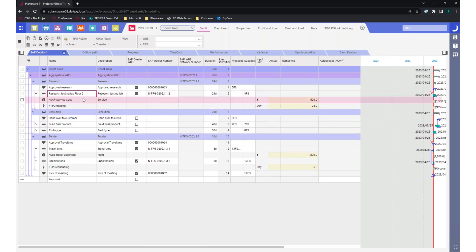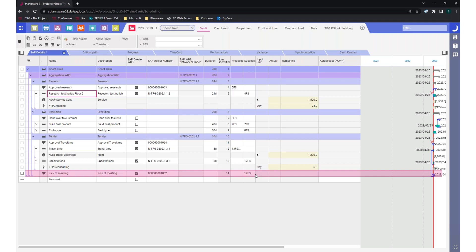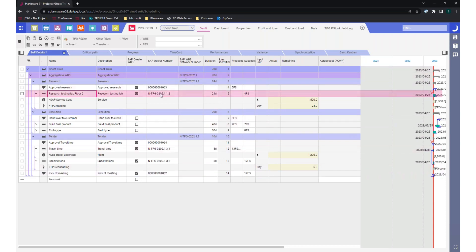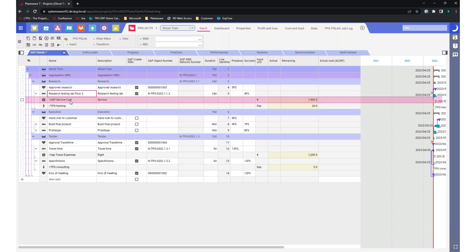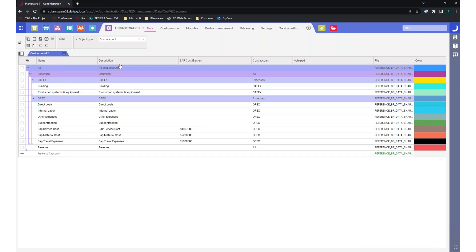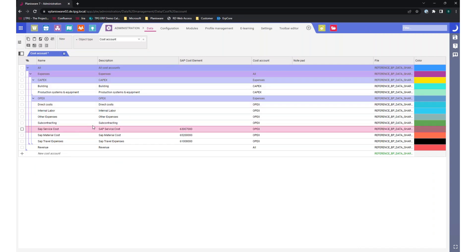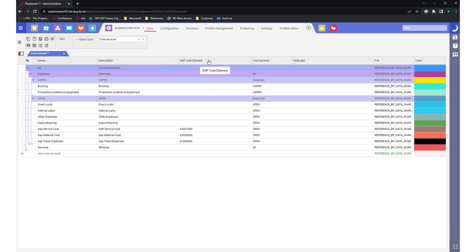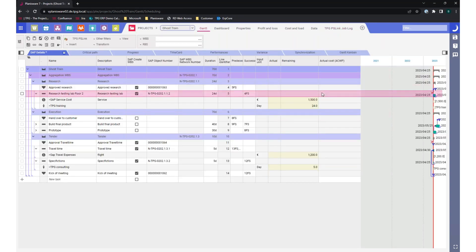Before I transfer the data, let me show how this works. We already have WBS elements, so we know the account-assigning elements in SAP. But we need more information. Let me give a glimpse at the administration background: here we see cost accounts, and we enhanced them with information from SAP. For example, this is a cost element in SAP, so SAP knows this is service cost, material cost, or travel cost. The same was done for resources — resources know their cost center and activity type. With all this information, SAP can work with the data we're going to send.